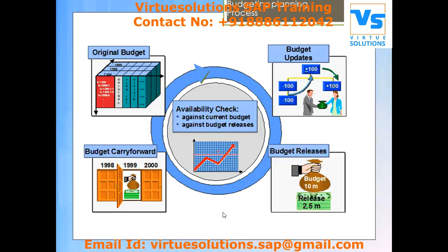But I should have one budget. If the budget has been overshot, the system should trigger me one mail. If the complete budget is exhausted, then the system should hard stop me. The system should not allow booking of any cost.